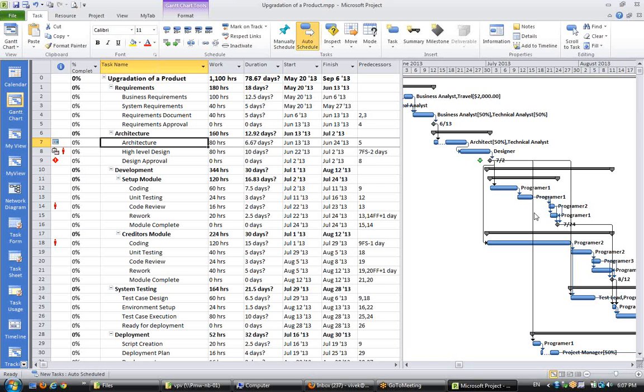So baseline has to be firm, because only then we know how much we have deviated, how much we followed exactly what we planned, and if we have deviated, how much and why. That's important. How much we have deviated and why, because this why will answer several questions which will help us to improve, to document lessons learned and make our future projects better.